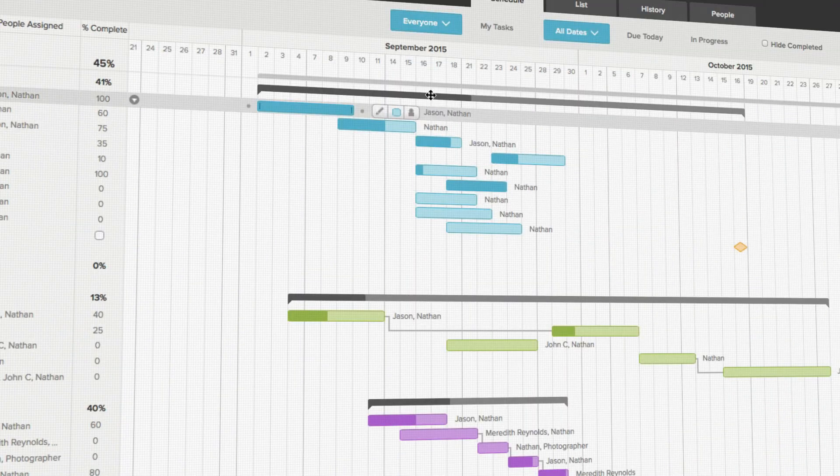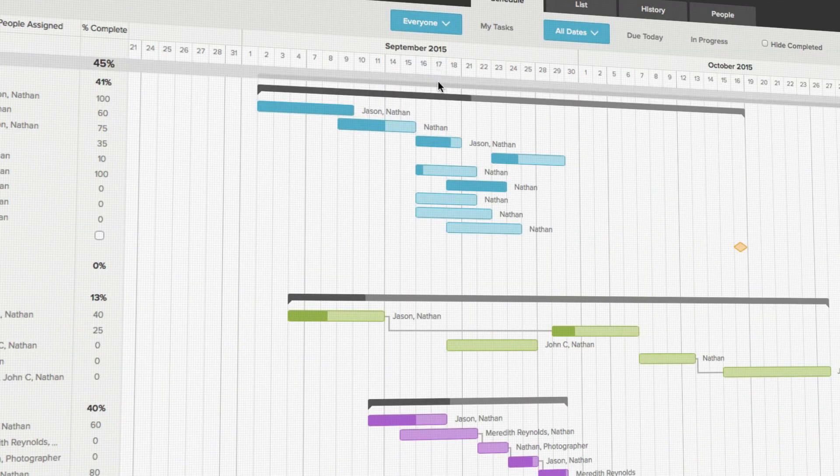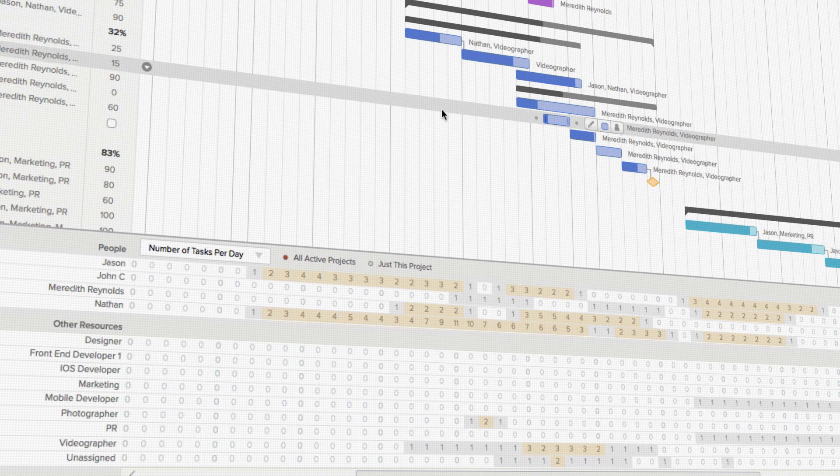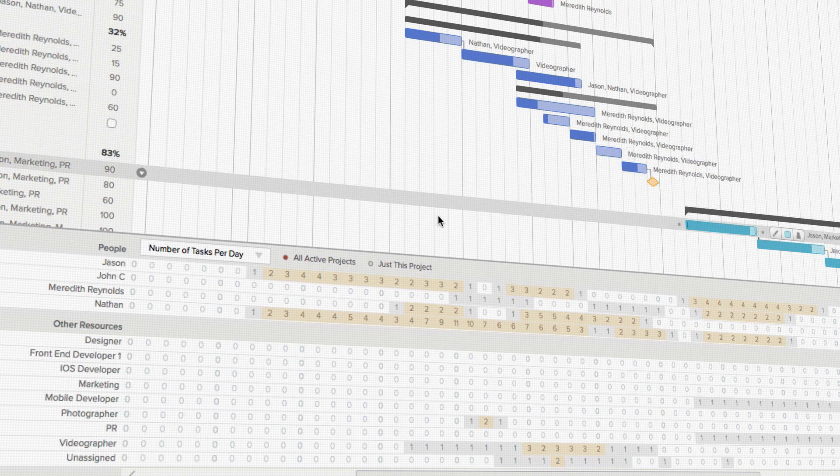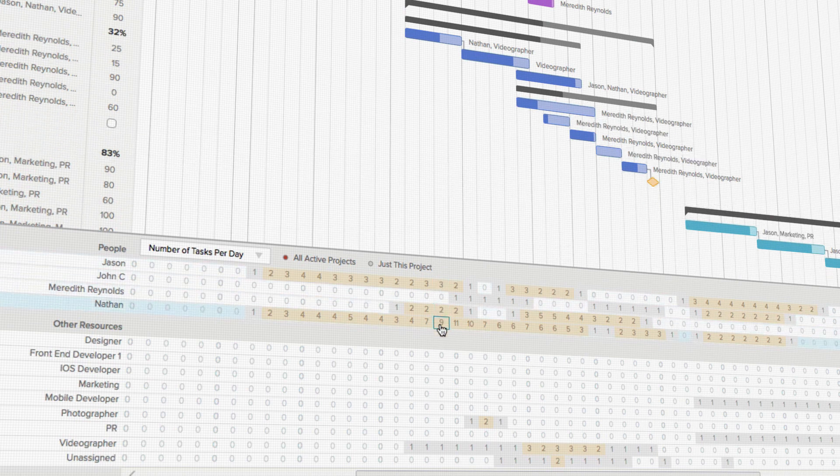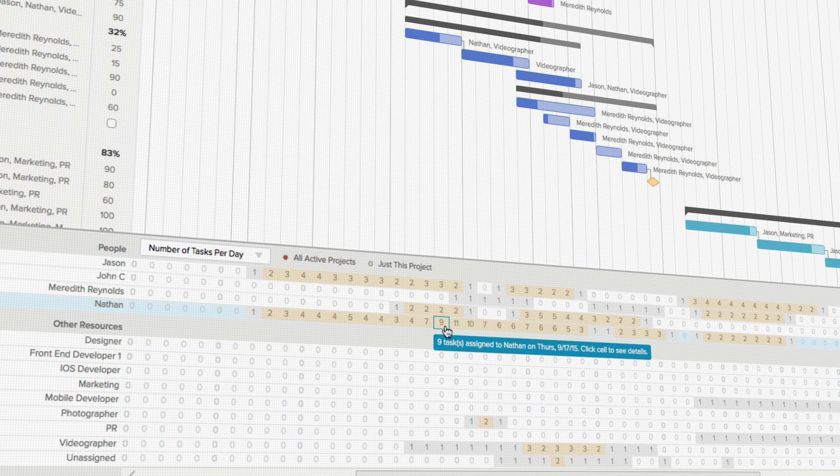For example, if I want to assign a new task to Nathan on the 17th, I first want to look at his availability on that day. I can see that Nathan already has nine tasks assigned to him across all active projects on the 17th.